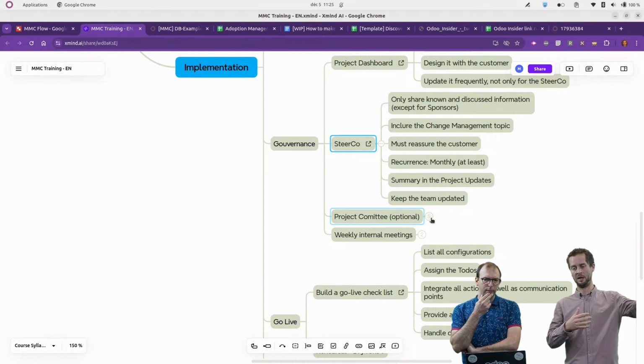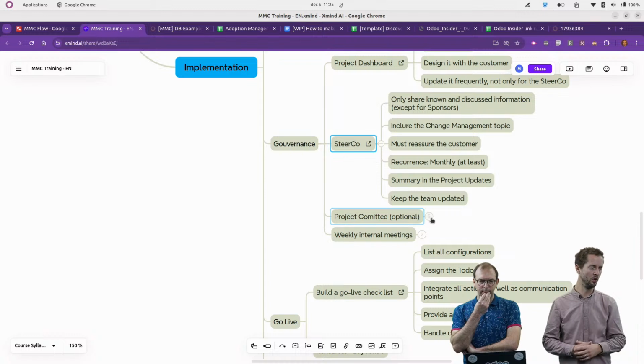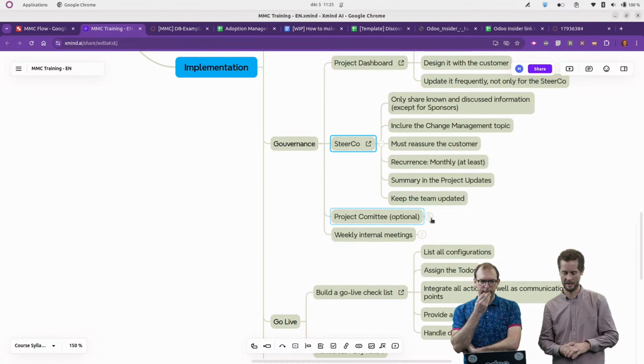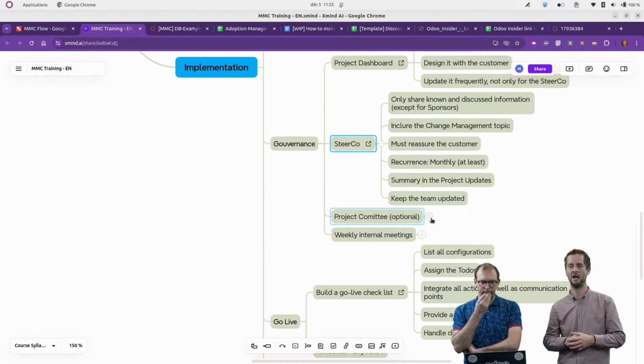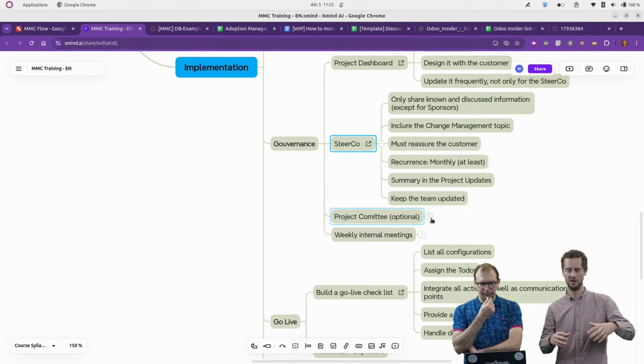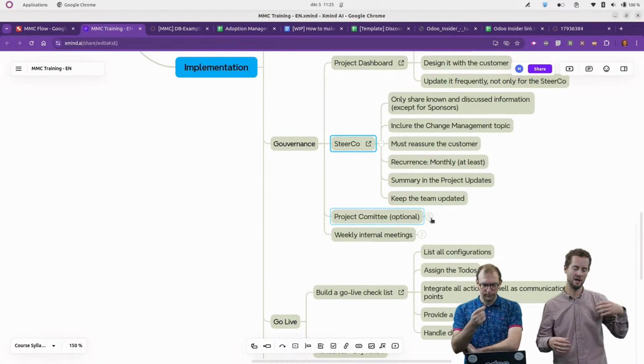And of course, it can take longer because we can have several go-live events. The longest project we have now finished took 10 years for the full implementation. In those 10 years, we had 2 upgrades, and we kept implementing because the scope was continuously expanding with new requests.